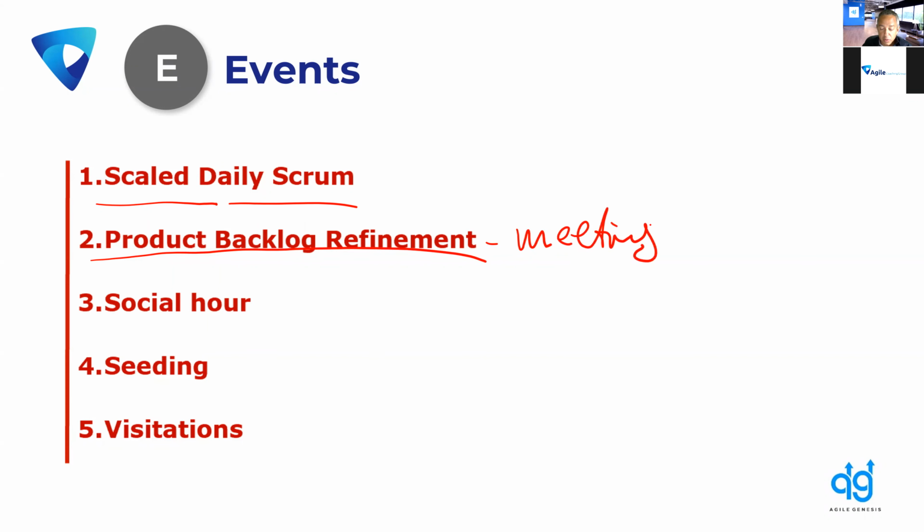If you're familiar with the Scrum Guide, you will know that the Scrum Guide considers 4 different events. In fact, it's 5 if you count the sprint. Those are the daily Scrum, that's the 15-minute meeting. That is the sprint planning. We also have the sprint review, we have the retrospective, and we have the sprint. So we have 5 events in Scrum. If you're practicing Scrum, I suggest that we add a 6. And the 6 is our product backlog refinement.